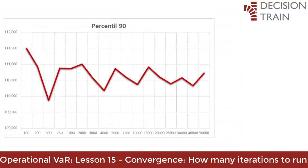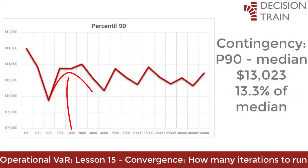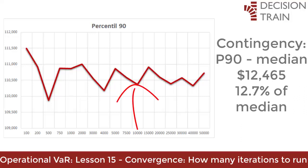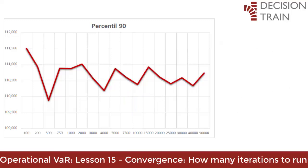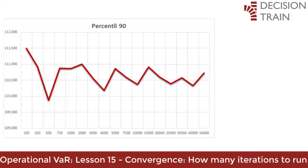If, on the other hand, you're interested in the P90, maybe in 20,000 iterations you still haven't achieved a stable enough percentile. Remember that probabilistic contingencies are generally constructed as the difference between a certain extreme percentile — 90 — denoting the confidence level, minus the mean or median. In this case, if you were to construct a contingency of P90 minus median after 1,000 iterations, you would allocate $13,023, which is 13.3 percent of the median. If you were to assign the contingency after the process has stabilized with 10,000 iterations, the contingency would be more accurate at $12,465, or 12.7 percent of the median. In other words, 10,000 iterations arrive at a more precise number; otherwise, just 1,000 iterations would have underestimated the contingency by almost 5 percent. It seems that the process requires at least 5,000 iterations to stabilize.